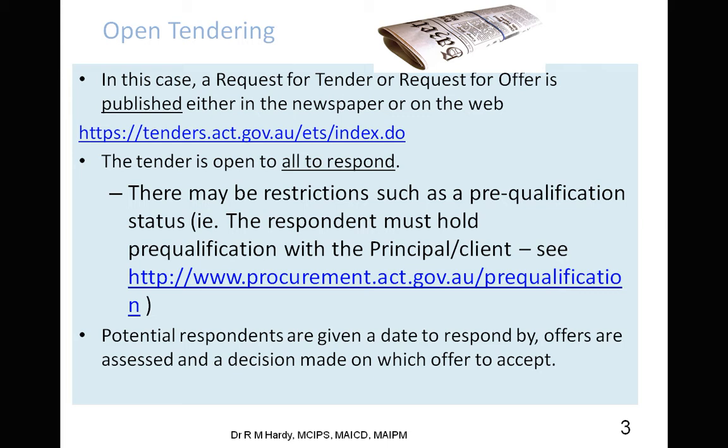The tender form will then list out the information that they are required to submit, which includes, of course, the price according to the documents, their registrations, how long the construction is going to take, what they're going to charge in terms of labor per hour, and also the cost of trades per hour, and all this stuff is so we can check against what they're charging us for in the first place, and secondly, if there are any variations, we can then see how much that is going to be per hour.